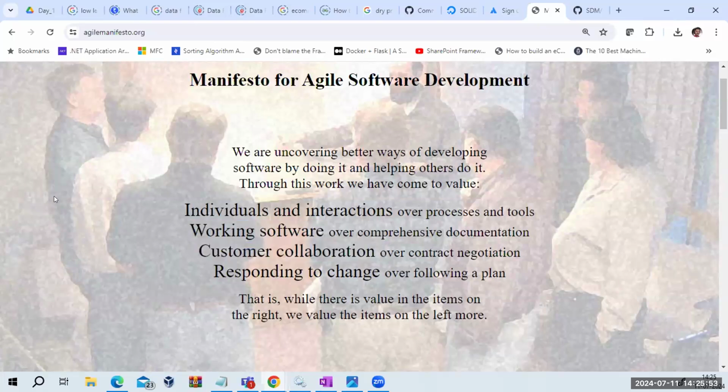Customer collaboration. In the waterfall model, during the time of analysis, you involve the customer in that discussion and then you directly introduce that customer at the time of the demo after 7 months. After 7 months, it may happen that the business of that customer has changed, or the requirement given by the customer was not understood by your people, but they worked on that area. And after 6, 7 months, we got the product, and the customer says, I think this is not exactly what we expected.